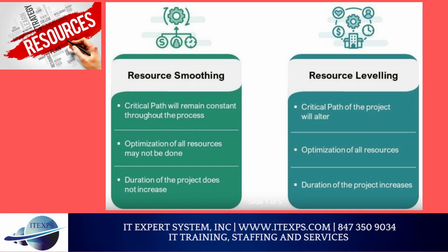Resource leveling. Balance demand for resources with supply. In this option, project end date may be pushed back, means project duration increases. Resource smoothing adjusts schedule activities. In this option, project end date is not changed.